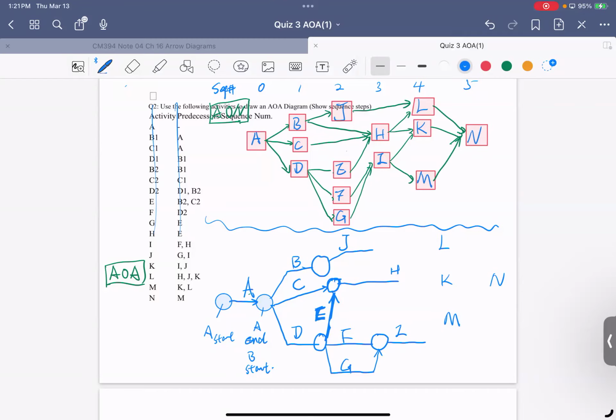We cannot, because this G and F are the same thing. So we need to have a dummy here. Yes, because when we number it, you will see here is 5, for example here is 15, here is 20. And those F or U is 15, 20, and G is 15, 20. Basically, they are the same thing.